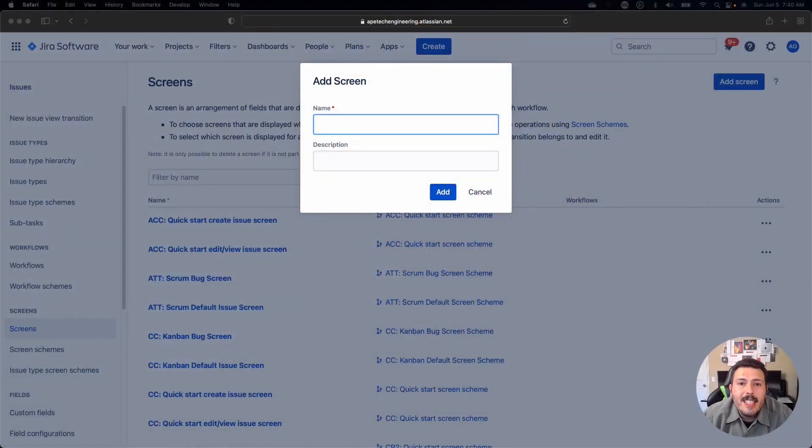Feature number 6: when you're transitioning an issue from one status to another, you can actually make a pop-up show up with additional fields that are maybe required for the user to fill out before the transition. So let me show you how to do that in Jira.